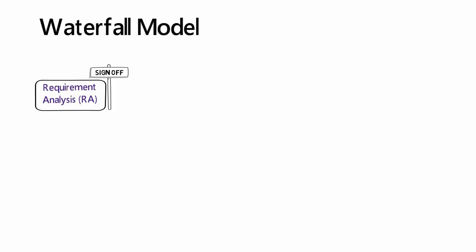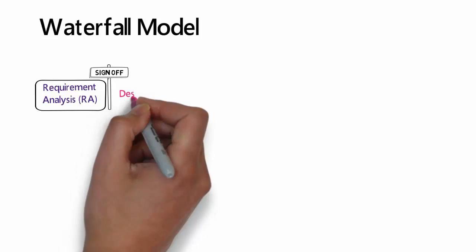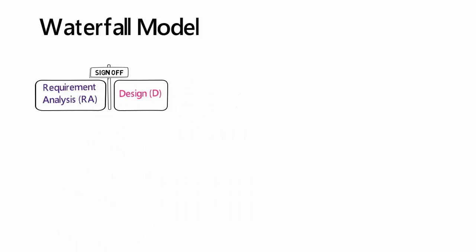The next important phase is the design. Here the design for the whole application is evolved, captured and documented. The input to it is the requirements document. Once the design is over, it will be reviewed, and customer has to approve it via a formal sign-off.